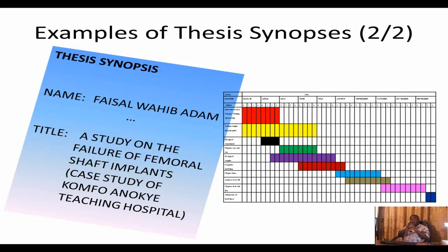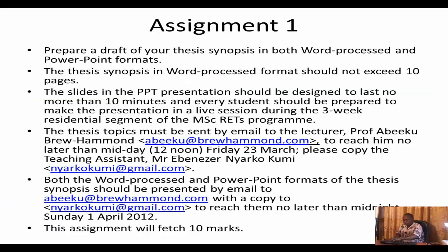So my advice is make it a point to do your Gantt chart, your work plan, so that within 6 months you have really completed the process for the thesis. Usually there are also overruns, so it's important to give yourself some slack time towards the end, and even beyond your projected thesis submission date.